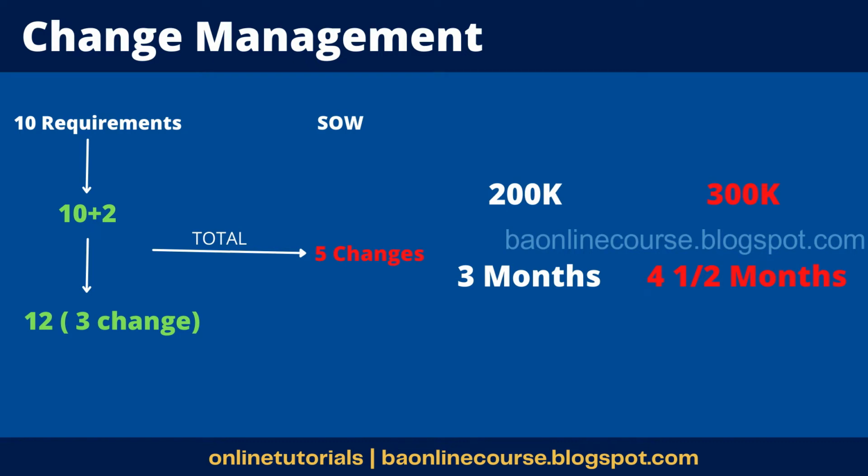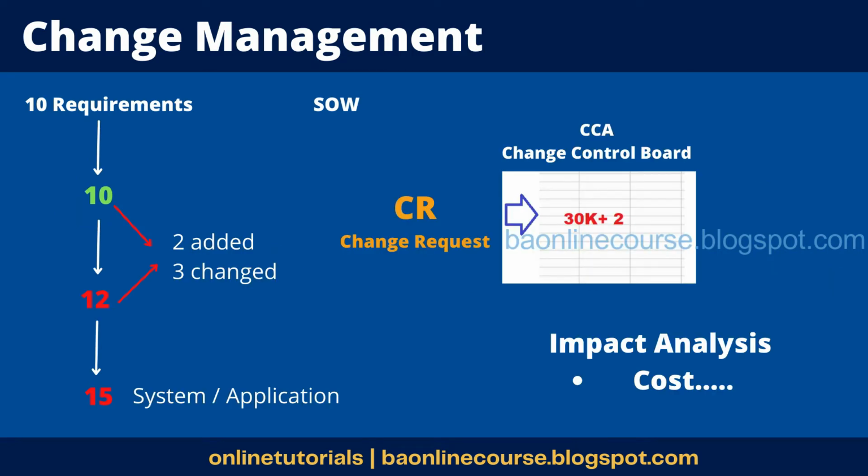If you say that initially at the start of the project we agreed with this change management process, so we need to have that documented. Can you fill in this change request form? We call this a CR. You will hear this term a lot. Change request. CR stands for change request. So you'll send him a template for change request and say, can you please add your new requirement in that, or the modifications to be done in that change request, because that's mandatory as a process.